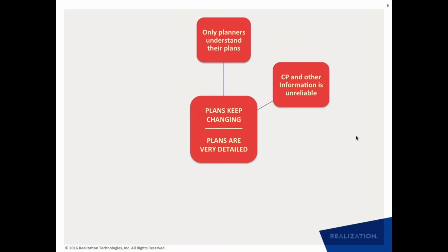So it's absolutely acceptable in a project that the critical path can change over the duration of the project. But if it keeps oscillating back and forth, that is what makes it unreliable. And as I described in the beginning, when you're trying to understand the status of the project, or when you're trying to understand what your daily priorities are, they are all coming from this basic critical path information. And if the critical path is volatile and unstable, then the information that is coming out of the project plan is pretty much useless.